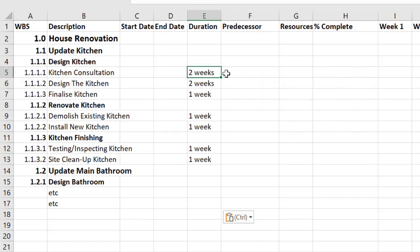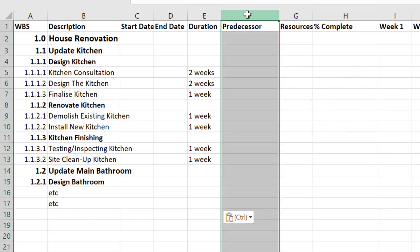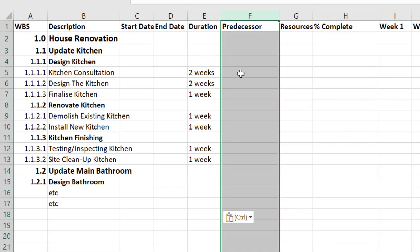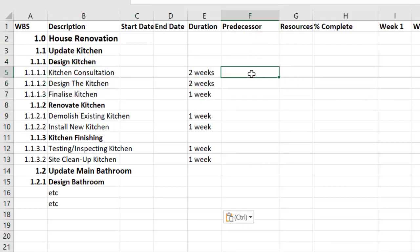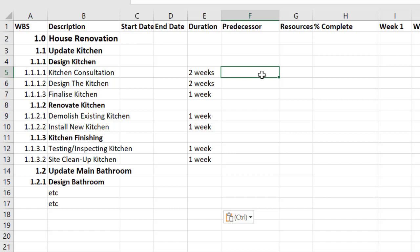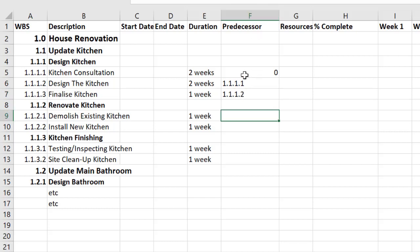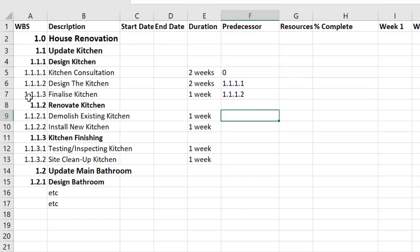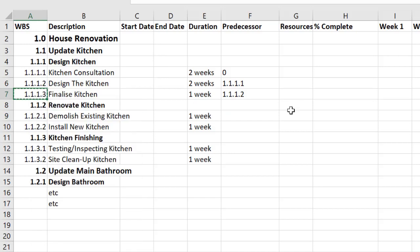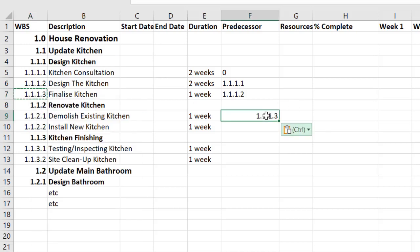Once I have these in I can start thinking about the predecessors or dependencies and I go through each of these lower level tasks and ask if it can be done on the first day or if it's dependent on anything. So with kitchen consultation it's not dependent on anything, there's no predecessor. Designing the kitchen though I need to do the consultation first to inform my design and make sure it's good. So there's a dependency here on 1.1.1.1.1 and the same here I can't finalize the kitchen until I've got the completed designs done. So that's 1.1.1.2. So here we're showing in the predecessor column that there are some relationships and the same here I can't demolish until I've finalized so I'm just going to copy that and paste it and down we go. I'm just going to format that in.